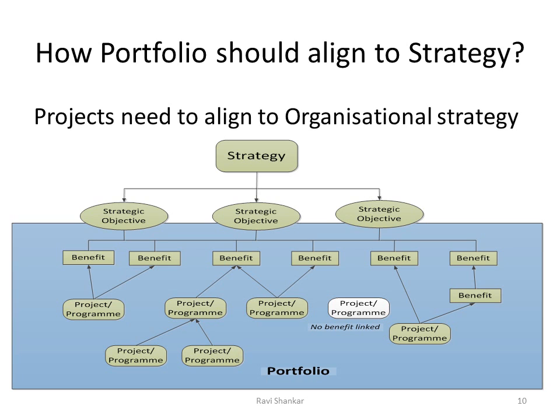In one of the examples I noticed, I was implementing a $13.6 million project. It was not linked to the strategy, but it was an idea coming from a senior member of the organization. Because of the political structure, he got the support. But when the portfolio manager started aligning these things to the strategy and the benefits, the corporate board realized it is a wastage of time and money, and they decommissioned that program.